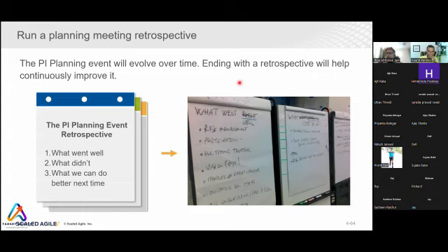But how can you mitigate it? You plan for better knowledge management. All the team members learn something about each other's work. There is more synergy in the team. So if one resource is leaving, the other resource can pick up his work. That is mitigation of risk. When I say acceptance of risk, I'm not doing anything. The resource will leave the company, things will go out of my hand, I'm accepting the risk.